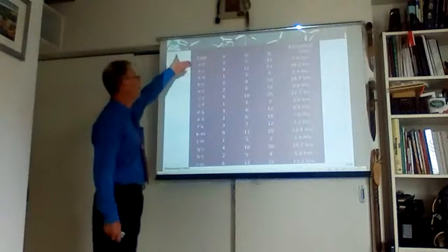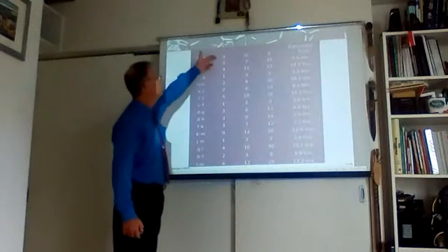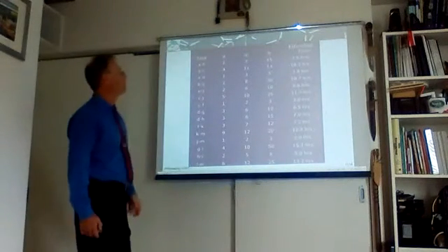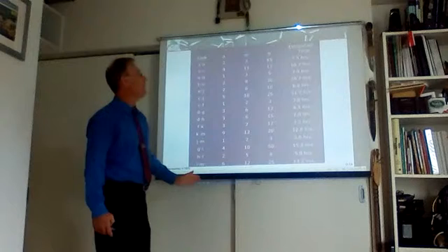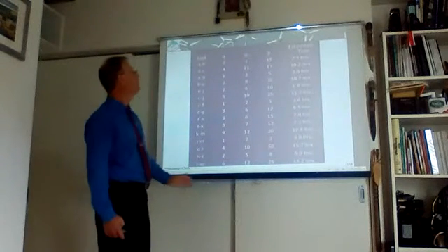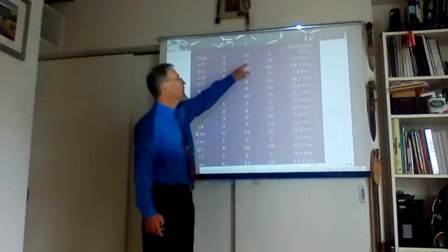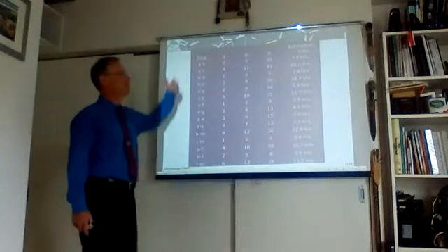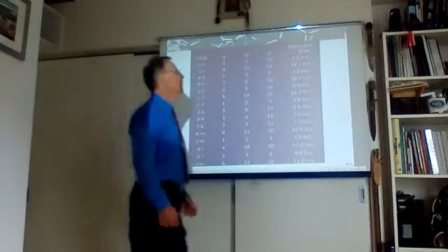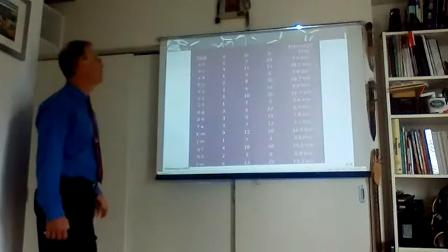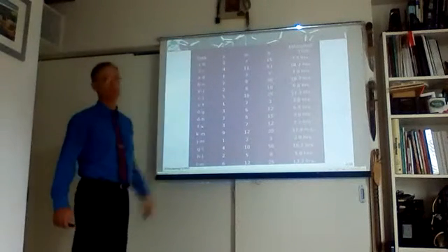And this is the table. For the task from A to B, we have the best time, the worst time, the pessimistic, and the most likely. The estimated total time will be, for example here, 2 plus 15 plus 4 times 7, the result divided by 6. In this case, we get 7.5 hours. That is the estimated time for the task from A to B.